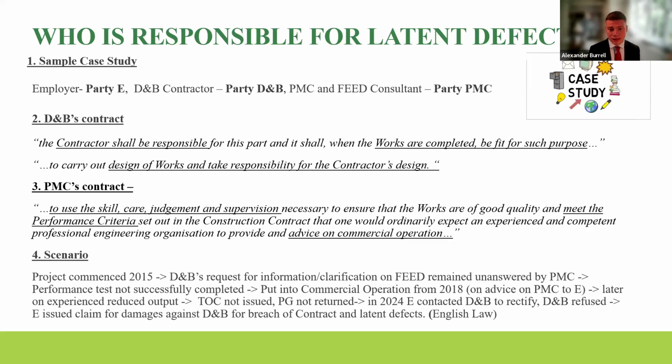And similarly, in relation to the claim against the PMC consultant, we're looking at 2 things: a failure to provide information on the FEED, and also the advice to put into commercial operations despite the unsuccessful test. Do either or both of those, separately or together, meet that test? Possibly. But we also need to demonstrate that that was a cause of the reduced output to establish the claim and damages.